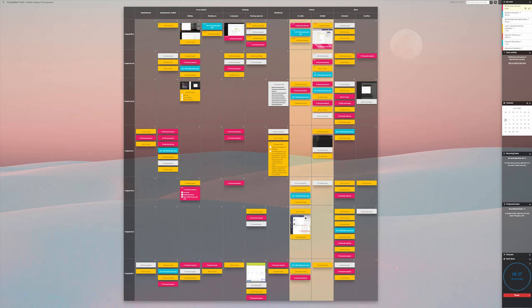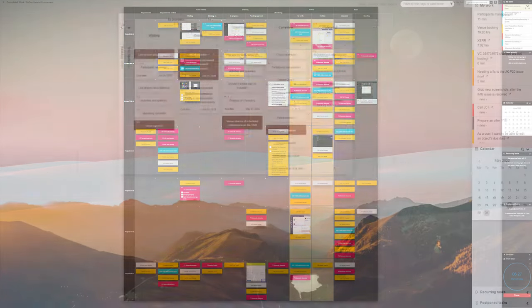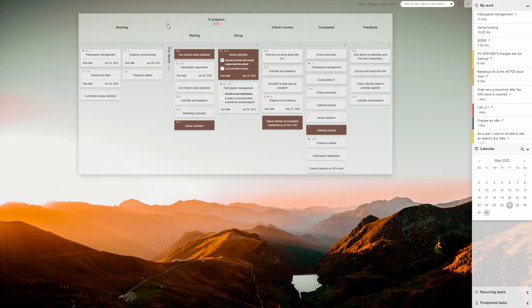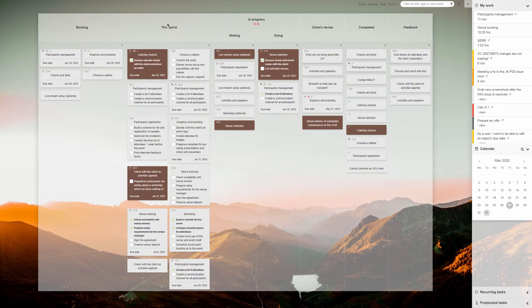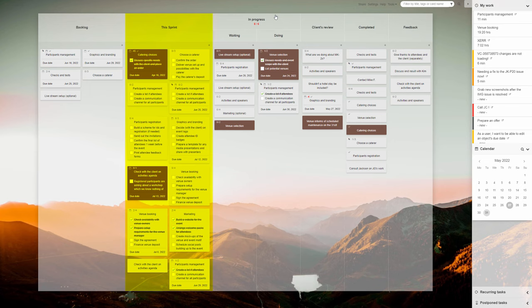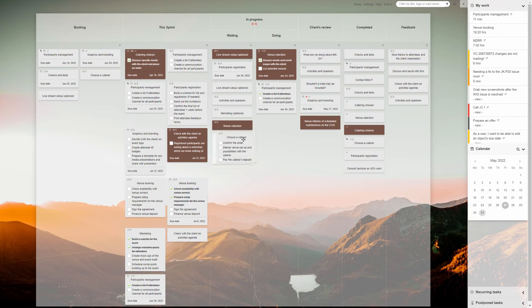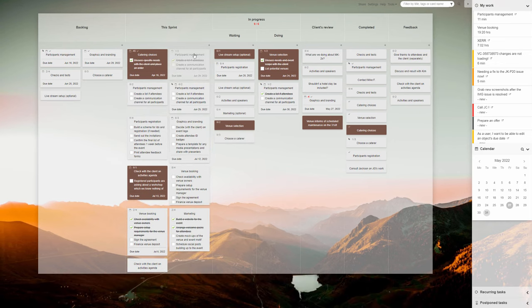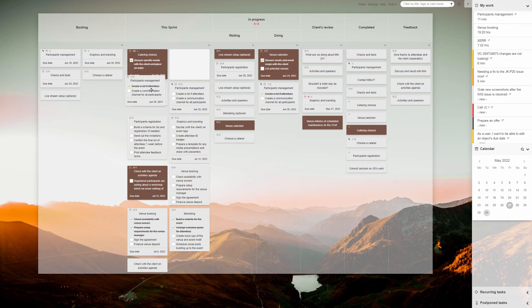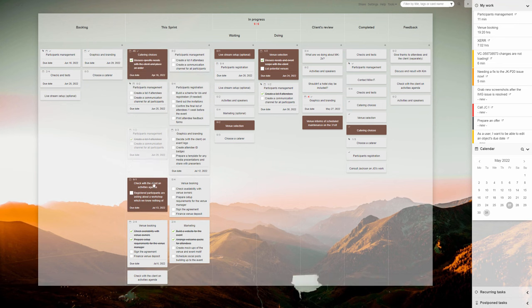The most straightforward approach is arranging two backlog columns: a general one for items to be done at some point, and a current sprint backlog. It contains only the tasks that are part of the current work iteration. The advantage of this way of arranging sprints is the possibility of adding it to most processes at any stage and removing or hiding it with just as much ease.